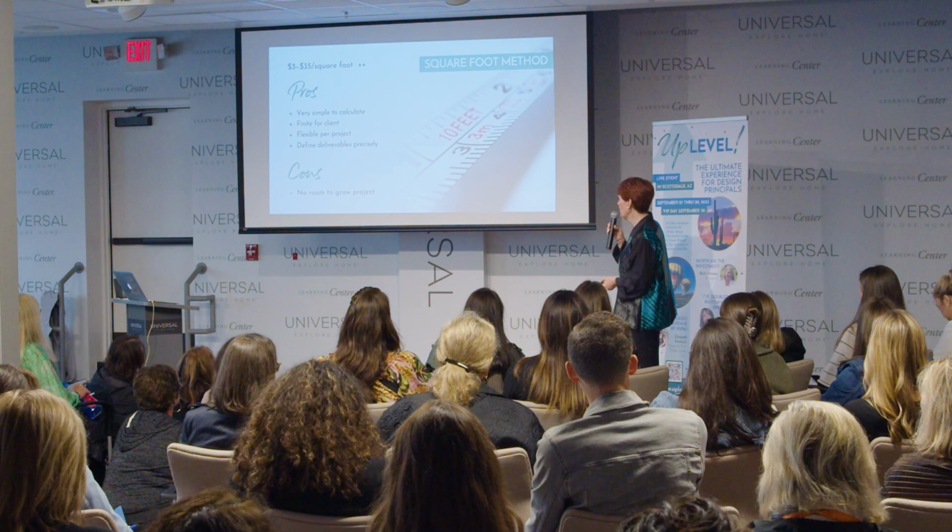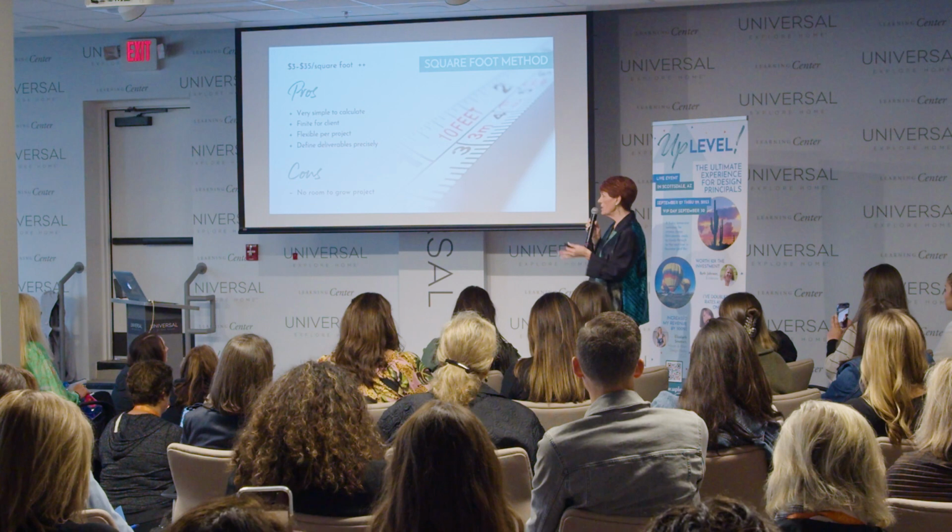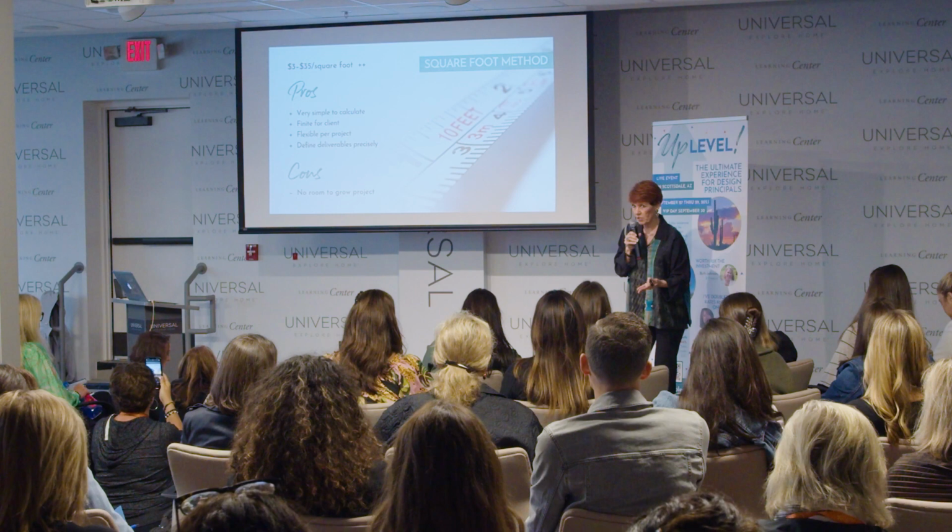That's super fun. Now, I say it's $3 to $35 a square foot. It could be $55 a square foot. It could be $75 a square foot. There's no limits to this, okay? But these are the averages that I'm generally working. I don't go as low as three. My lowest is usually $10 a square foot, and that's finishes, fixtures, and lighting.